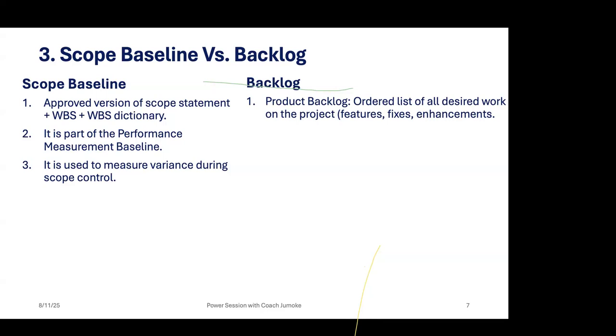the product owner will now ask the customer, see, the product team will not be able to deliver everything. So let's prioritize it. So you prioritize the product backlog based on the value that the customer places on each of the items in the product backlog. It is the responsibility of the product owner, not the Scrum Master.